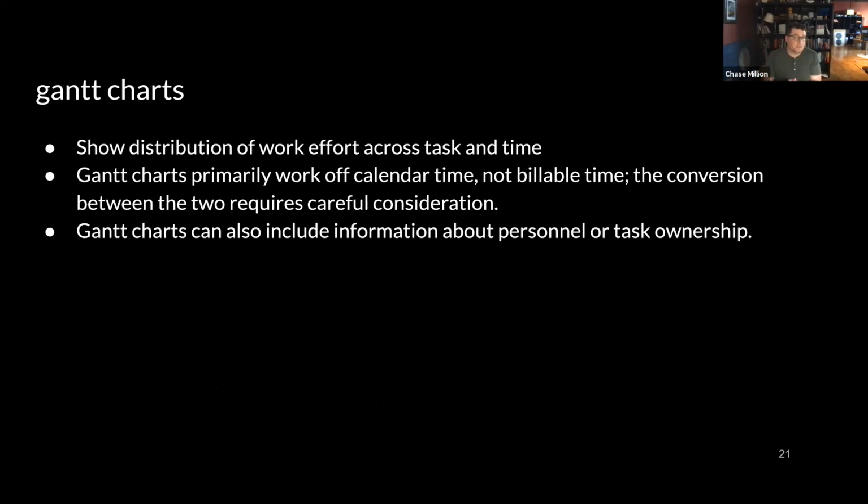That is in part because many people in a research context don't work full time on any one particular project. You might only have half of their time or a quarter of their time. Also, there are critical events in any project that everyone has to wait on. There are things that have to be created as inputs to other things. So the project in calendar time might be 3-4 times the amount of hours in estimated time. The conversion between those two things is, again, very complicated, and there's no fixed formula, and it's just something you have to think really hard about: how do all things rely on all other things?